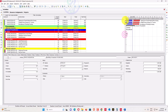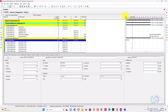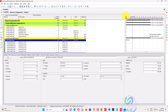I have a project with a certain finish date. A common question is: how can we get baseline details when our project has no baseline? We only have an updated schedule and were never given a baseline. This is also relevant to delay analysis using the collapse-as-built method, where you have only an updated schedule and want to remove progress to recreate a baseline, so you can detect additional delays and compare the updated schedule against the baseline.